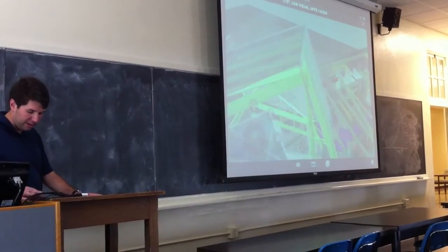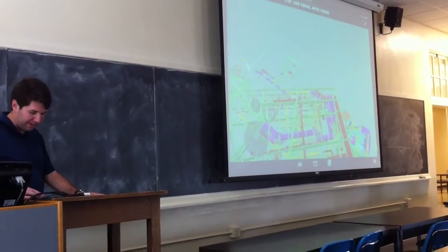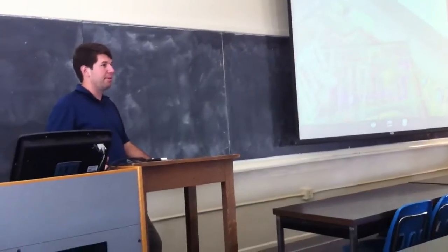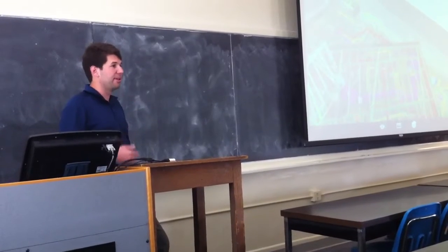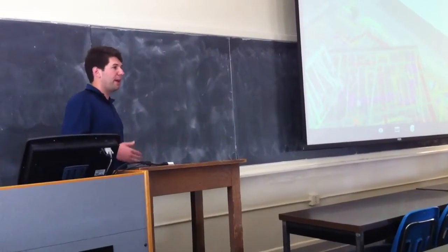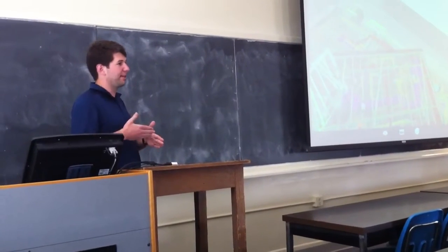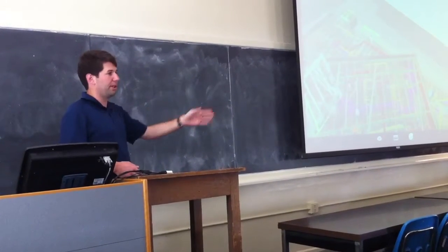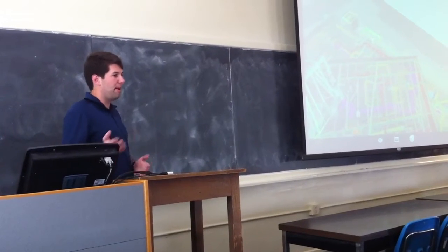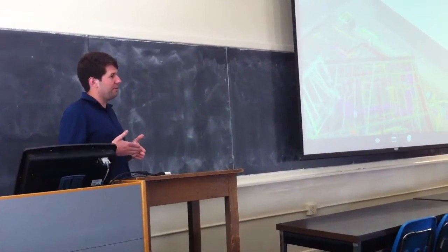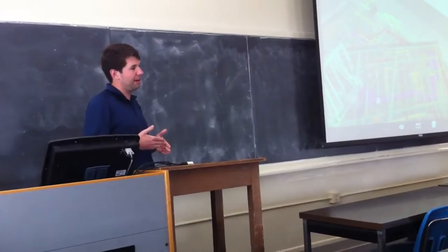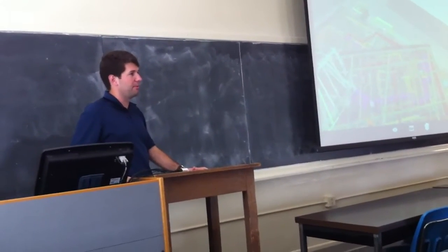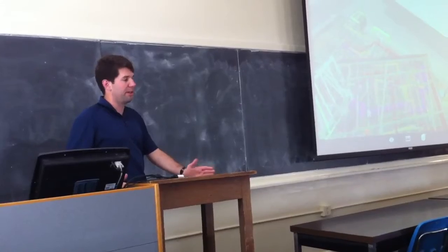And you can kind of see what I deal with on a daily basis is coordinating where these systems are running. For the most part, I don't know if you guys understand this, but when an electrical engineer, when a mechanical engineer, when everybody lays out their stuff, they don't necessarily get with each other. Electrical engineers' stuff is so small, sometimes they don't care where it's going, they just put it wherever. The ducts, your plumbing, all that, they don't necessarily decide, okay, this needs to go here. And even their drawings are not going to be exactly where the subcontractor goes.